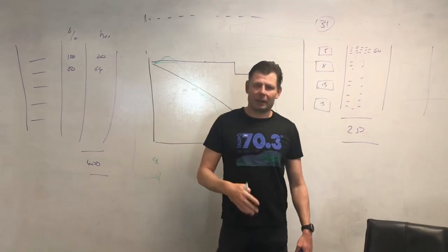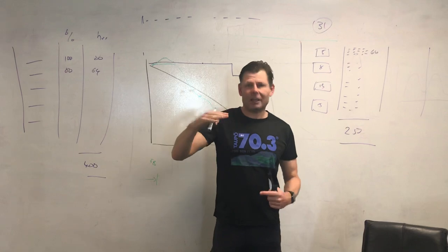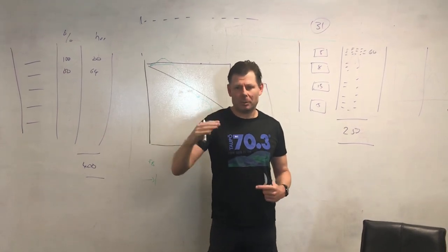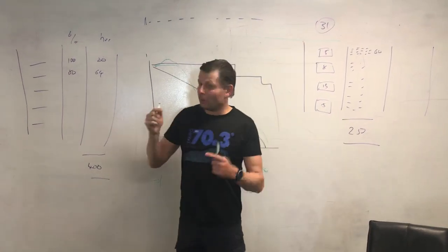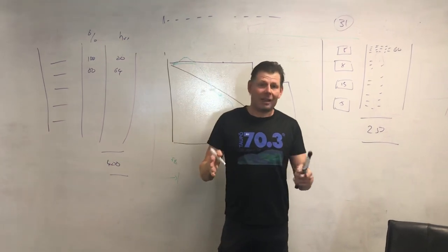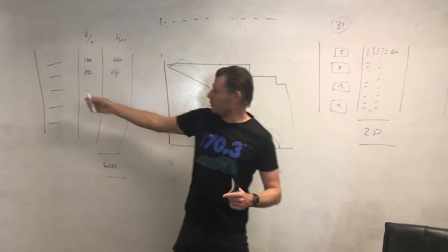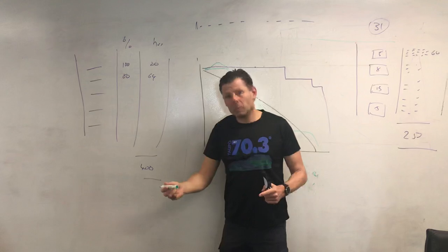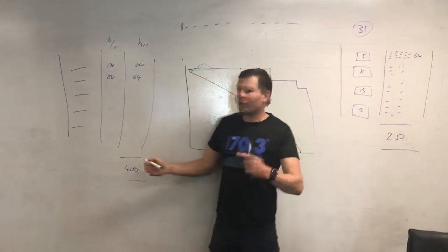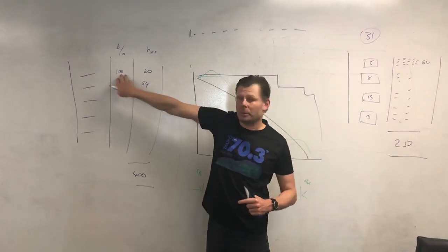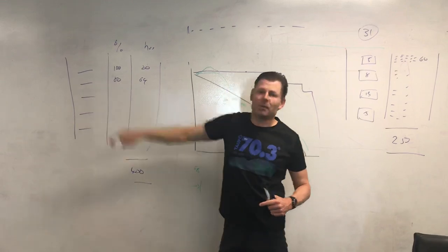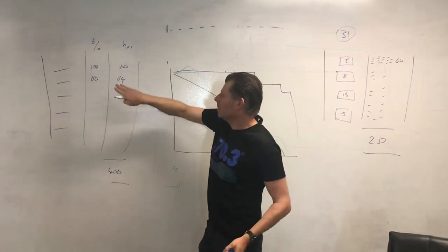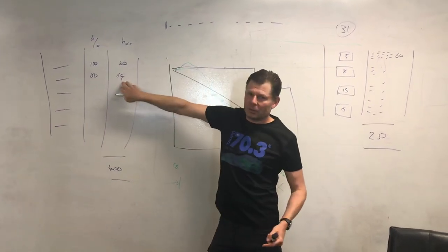But for the purpose of planning, it's better to have a ceiling of the theoretical maximum number of hours we've got. So for a 2 week sprint, that would be 80 hours per person. So if you've got a team of five, your maximum would be 400 hours. Let's say, for example, one person though is not at 100% utilized, they're only 80% because they're off for 2 days, for example, then that would be 64 hours.